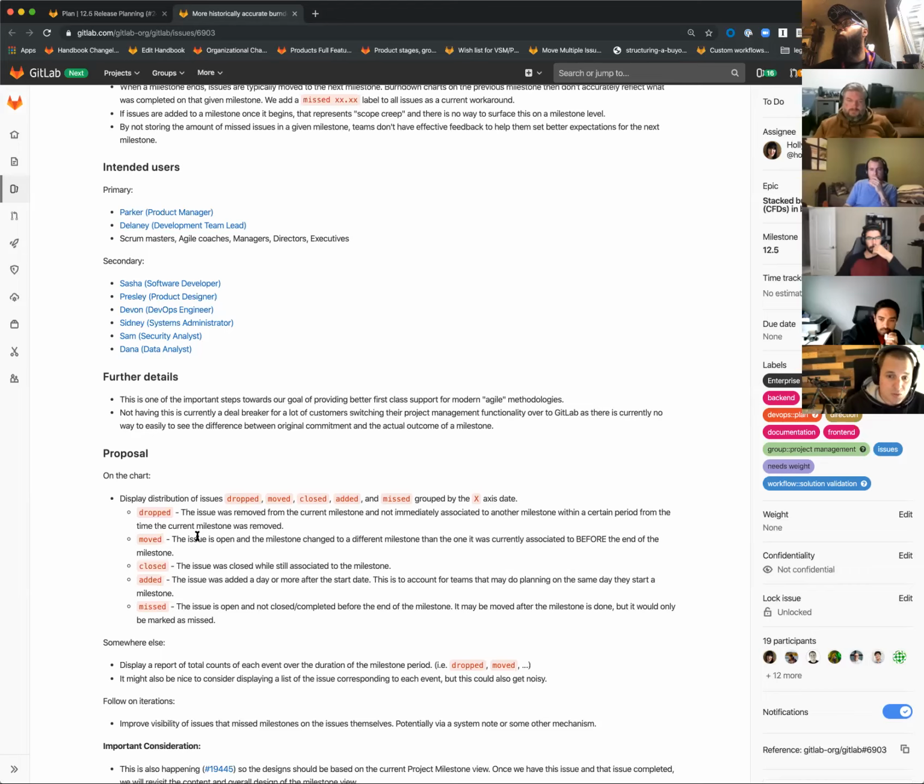The issue is closed, which means it's probably completed. I guess there are use cases where it could be closed and not completed, but I don't want to get into that with this iteration. If there was an issue added, so the basic idea is if it was added a day or more after the start date. A lot of teams will start a milestone and do their planning on that same day. So if we wait to start measuring the added until the day after it starts, you have that wiggle room if they're going to finish their planning and get ready to go and finalize things that day. We'll start tracking scope added after the first 24 hours, or first day, that a milestone starts.